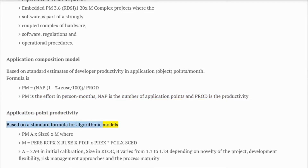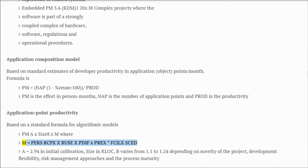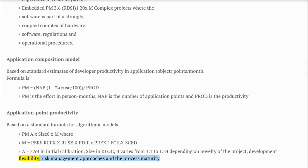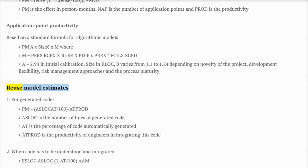For algorithmic models: PM = A × Size^B × M, where M = PERS × RCPX × RUSE × PDIF × PREX × FCIL × SCED. A = 2.94 in initial calibration. Size is in KLOC. B varies from 1.1 to 1.24 depending on novelty of the project, development flexibility, risk management approaches, and process maturity.